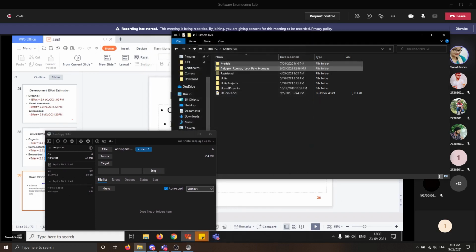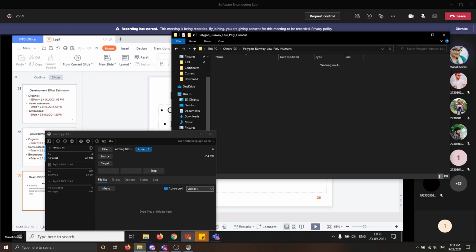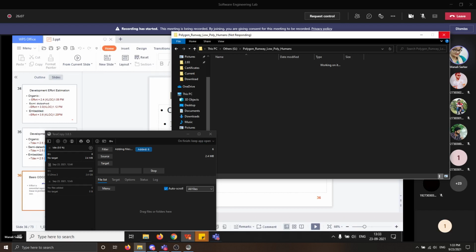This is because the exponent in the effort expression is more than 1. Thus the effort required to develop a product increases rapidly with project size. But the increase in effort with size is not as bad as it might be portrayed. The reason is that COCOMO assumes that projects are carefully designed and developed using software engineering principles.